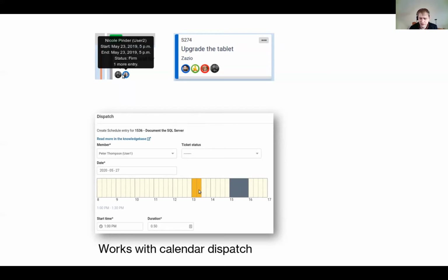So if somebody is assigned a certain time of day, you can view that information right on the Kanban board. You even get a bit of a clue here. When it has an outline, it means someone's assigned right at a certain time and day. If it's blue, it means it's out in the future. If it's green, that means it's a today assignment, so this is stuff that you've got to handle today. If it's red, that means they've been assigned, but it's in the past. So that's a problem that you want to go and review.